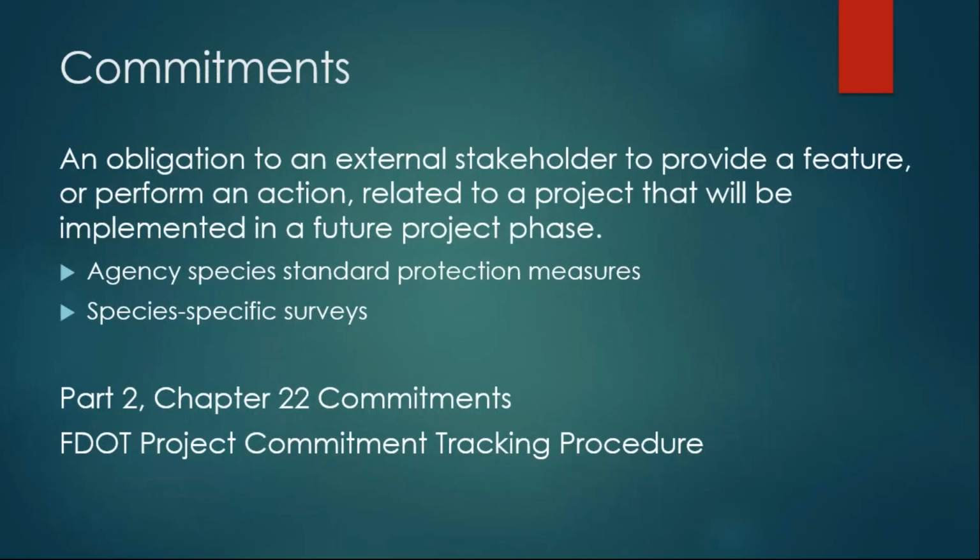Species-specific surveys could also be identified as commitments. There is a specific chapter that talks about PD&E commitments, Part 2, Chapter 22. And then there's also the FDOT project commitment tracking procedure that I'm going to refer you to. It describes how the department tracks commitments from PD&E all the way through construction.